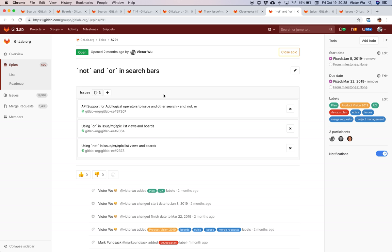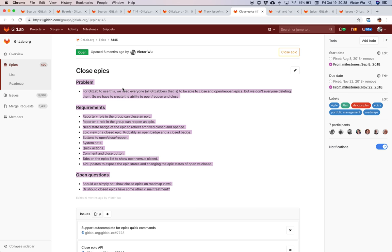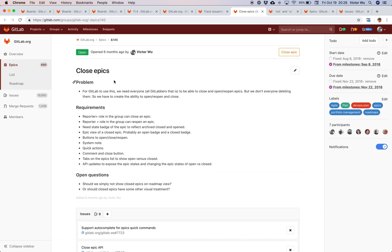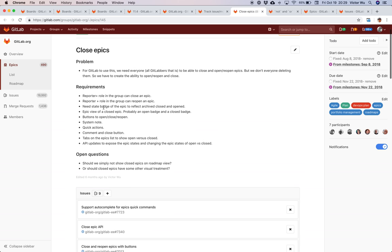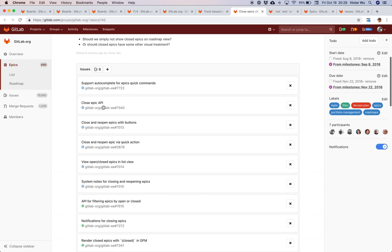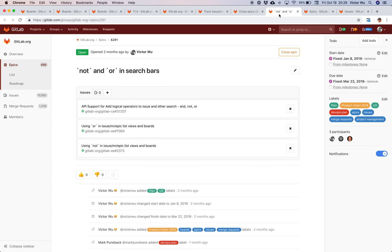An epic is a container that holds multiple issues. It's a higher-level abstraction — a feature or a strategic initiative. One way we use epics at GitLab is to organize many different ideas from issues together, maybe creating extra ones or splitting an issue up, and then grouping them into an epic as a logical feature. For example, this feature is called 'close epics' — somewhat ironically, we're using an epic to track the feature to close an epic.